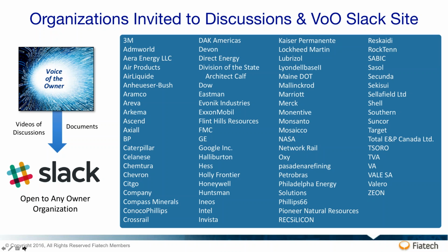Yeah, I mean, there's a good example. I think I'll say it now because I might forget later. There's an example about the ripple effect associated with change orders, and EPCs have models that apparently allow them to weigh the complexity of the change, the time in the life cycle of the project when the change took place, what happened with respect to change to influencing activities, and augmenting all the information associated with supporting the change.